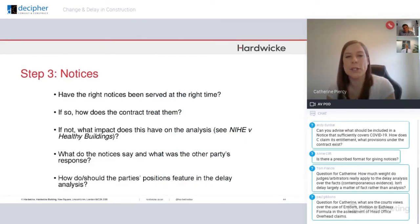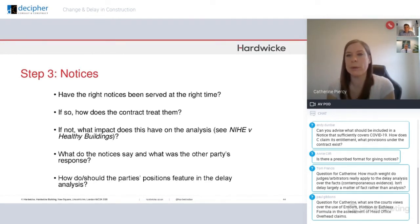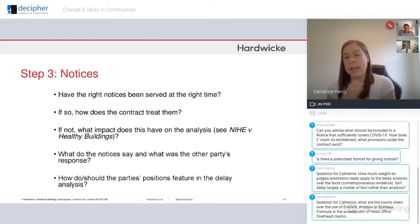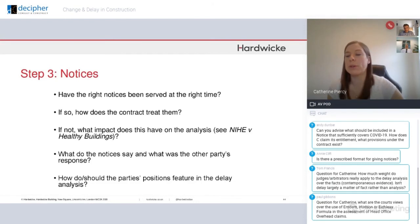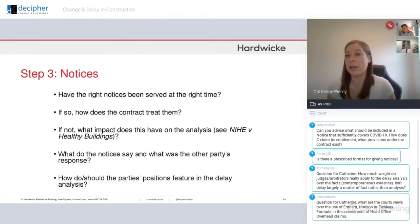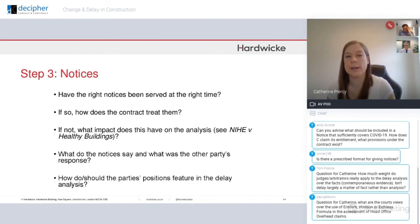Step three: notices. Have the right notices been served at the right time? If so, how does the contract treat them? If not, what impact does this have on the analysis — does it prevent you bringing a claim at all because they were a condition precedent? Or does it not matter? And even if the notices aren't specifically needed to give rise to your entitlement to delay, what do they say and what was the other party's response? Those are really interesting in terms of what was being said contemporaneously. So how do those parties' positions feature in the expert's report?